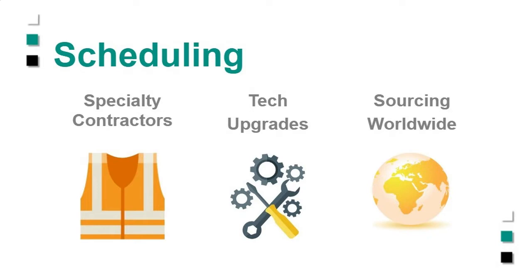So instead of updating daily or weekly, you start to push that off to bi-weekly, every 2 weeks, or once a month. And when you get into once a month, you're sometimes using 6 weeks old data when you're running your project. In this day and age, that's just too much risk that you're taking on.